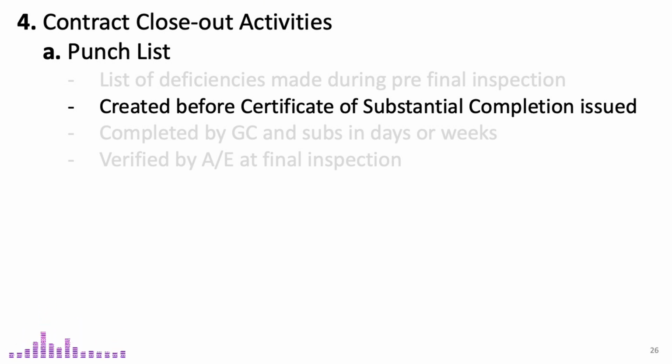Creating a punch list is often a prerequisite for issuing the Certificate of Substantial Completion, a significant milestone in construction projects. This certificate signifies that the project is complete enough for its intended use, shifting responsibility to the owner while the contractor addresses the remaining punch list items. It also triggers warranty periods, allows occupancy, and sets the stage for final payment and project closeout.